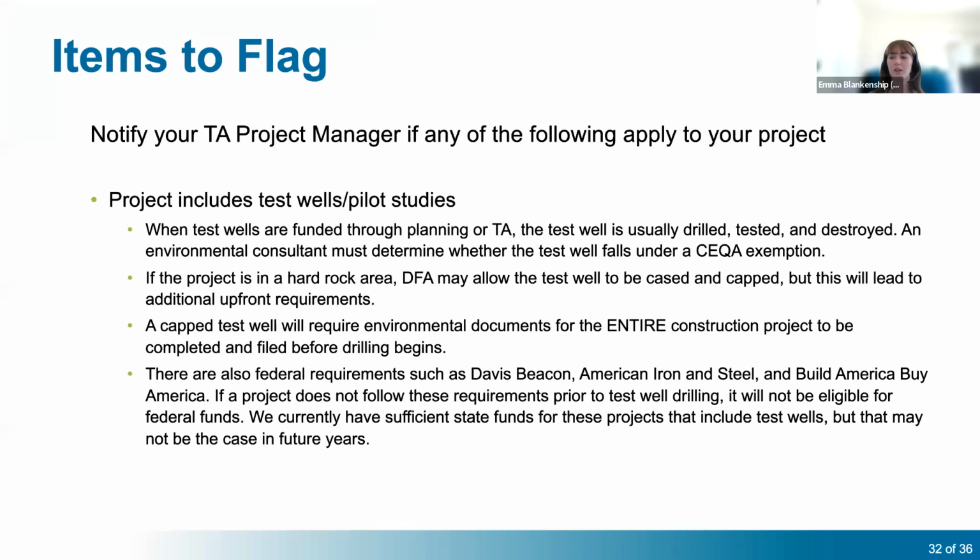Also, test wells are an important point that we want to go over. So when you have a test well that's being funded through planning or technical assistance, the test well would usually be drilled, tested, and then destroyed. And an environmental consultant is going to have to determine if that test well falls under a CEQA exemption.